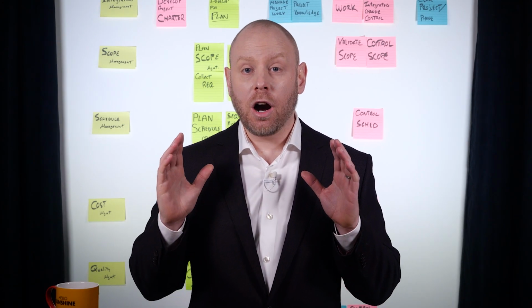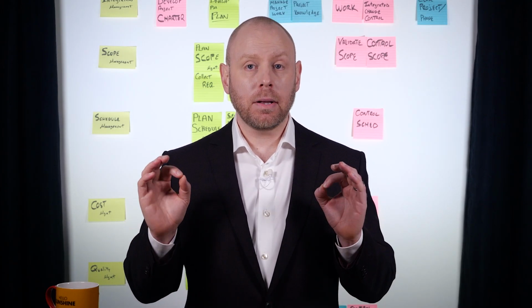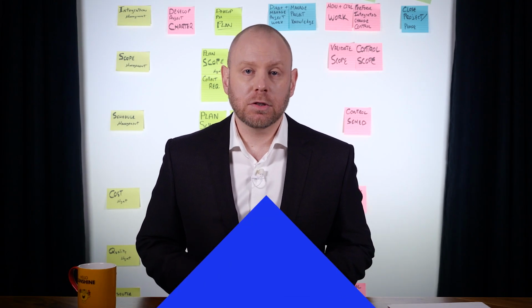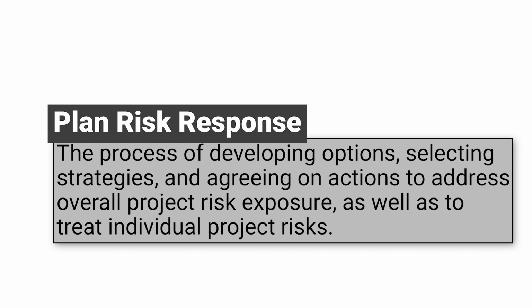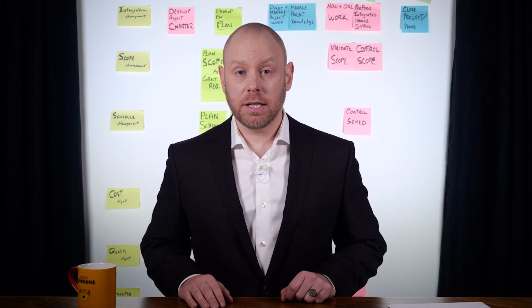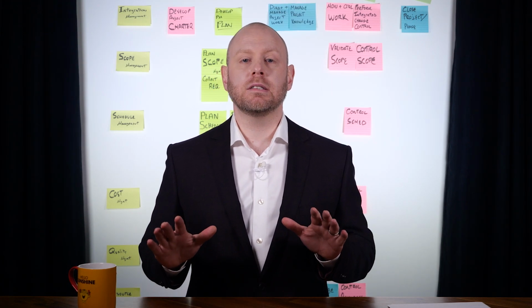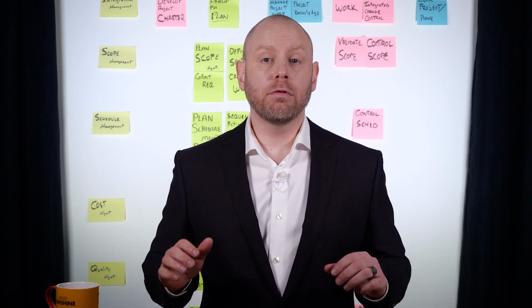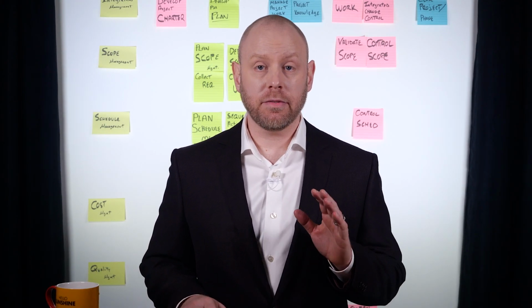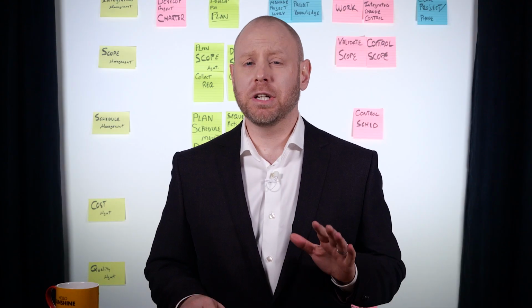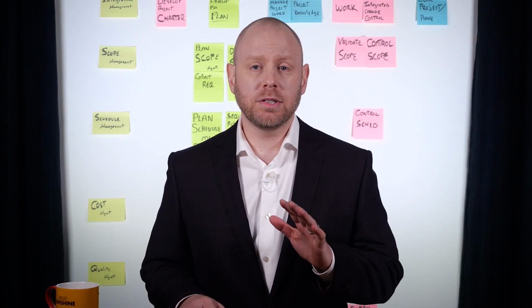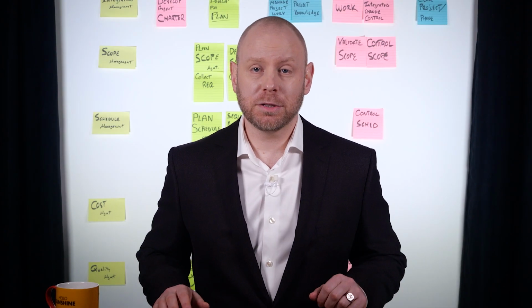Next step, and our final step today, is planning risk response. Plan risk response is the process of developing options, selecting strategies, and agreeing on actions to address overall project risk exposure as well as to treat individual project risks. This process fundamentally takes everything up to now on risk and forces us to come up with a plan to deal with it. Our risk responses need to be appropriate for the significance of the risk, be cost-effective, realistic, agreed to by those involved, and owned by a responsible person.